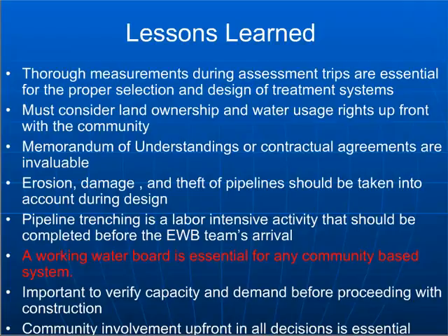and then returning for an implementation trip and completing the system in one shot. It's much more likely that you're going to go and collect some baseline data, return and do some preliminary design, and perhaps come up with several different design options for the community. Then go back to the community, work with them to figure out which option will work best for them and how it fits as far as long-term operation and maintenance goes.